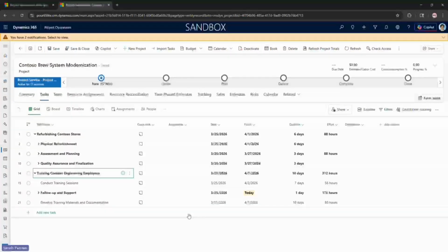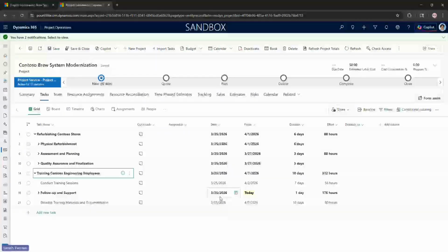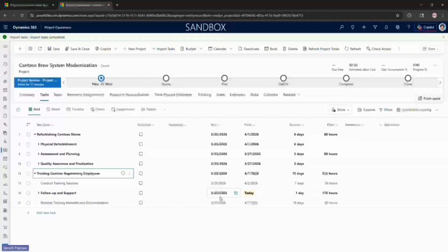So imagine you have some custom columns already defined in the project, which you also want to bring along with these tasks. On similar lines to what we have with copy project, where we have a copy project view where you fill in the custom columns that we want, similarly, we have a copy task view wherein you can say which custom columns you want to bring in along with these tasks, and those columns would be brought in automatically.